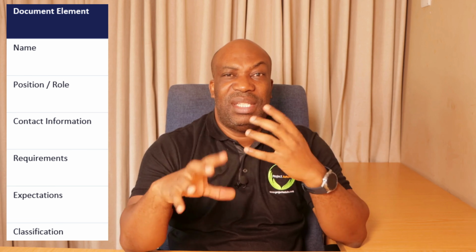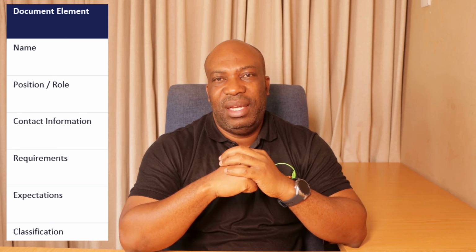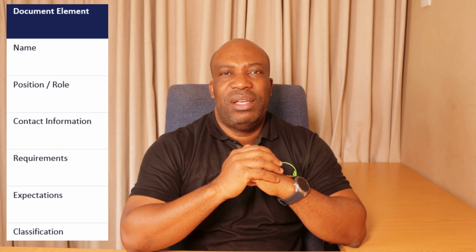In this section of the video, I'm going to take you through the elements or the sections that you have to consider in a project stakeholder register. So let us go through the elements one by one. The first one that is expected is the name. You need to record the name of the stakeholder. You need to identify them. I understand there could be some cases where you are not even aware of the individual names. It is also best to use the organizational name at that point. That is very important. For example, you might say it's marketing department. You might even say external auditor, or you can put actual names like Oscar and so on.